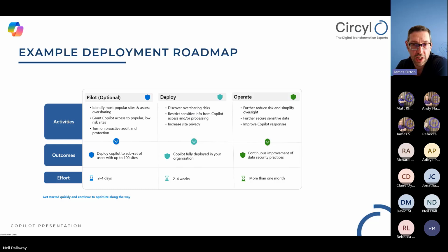So based on our strategy, which we've just defined, what phases are we going to have? So in this example, it's defined as a pilot phase with a restricted SharePoint search. So that's essentially limiting what Copilot can see, which SharePoint sites it can see, to give us time then not only to evaluate Copilot for those users, but also to address some of those security concerns and other technical issues around our environment. Obviously, to have a plan, we need to say how long we think each of those phases will be, how we'll measure success. Obviously, again, each organisation will probably be different, but this is probably a good starting point for a lot of organisations.